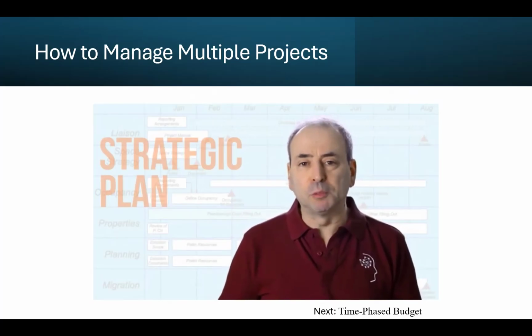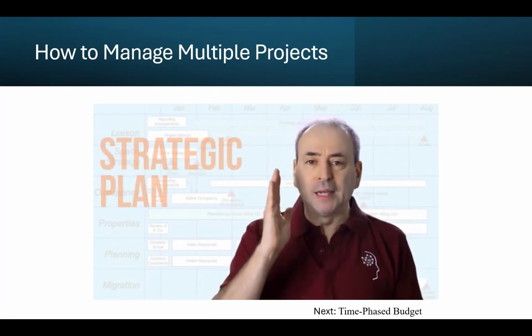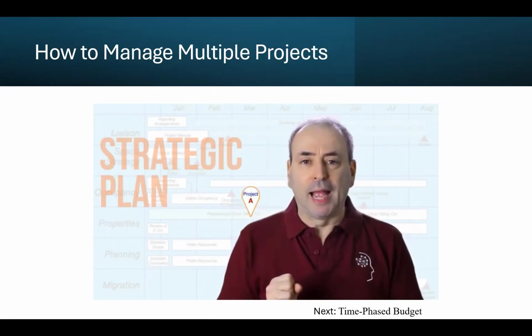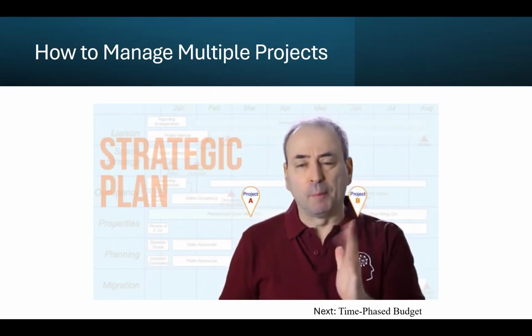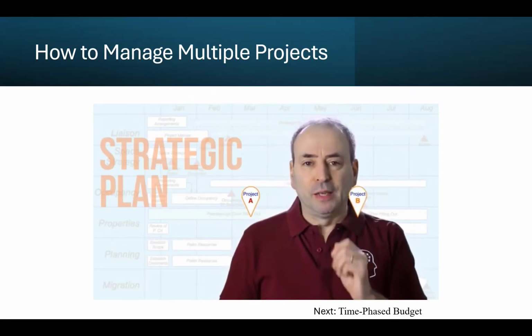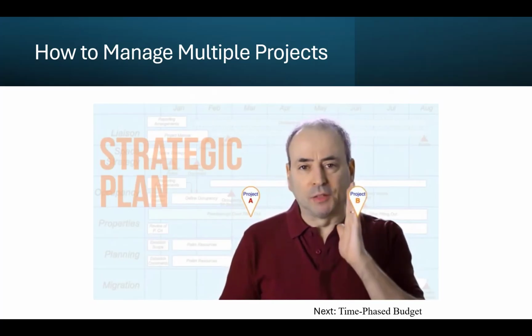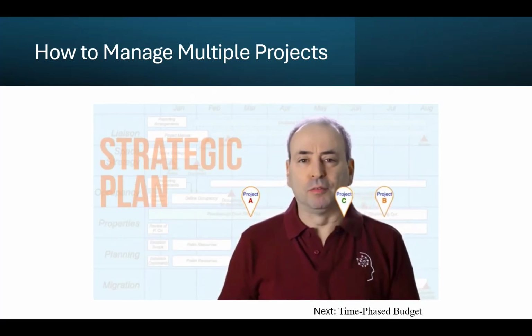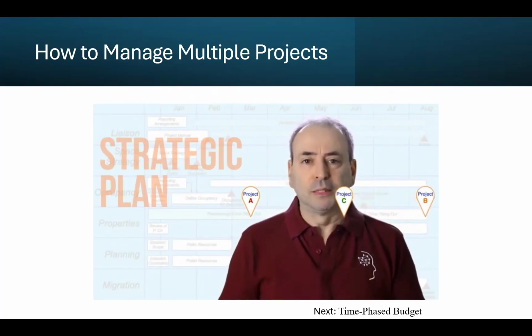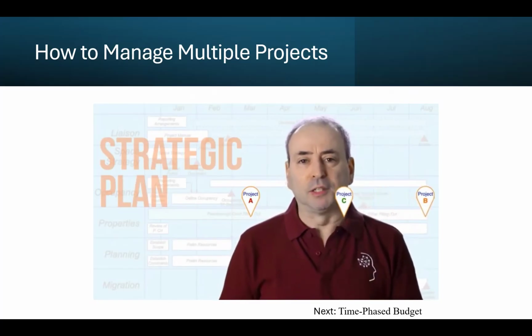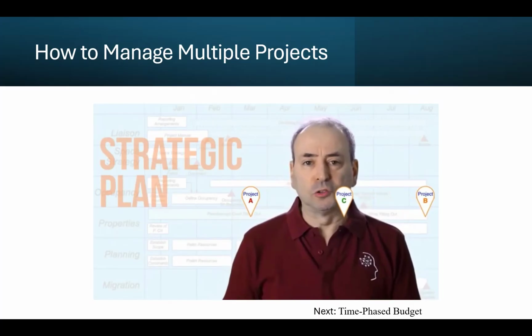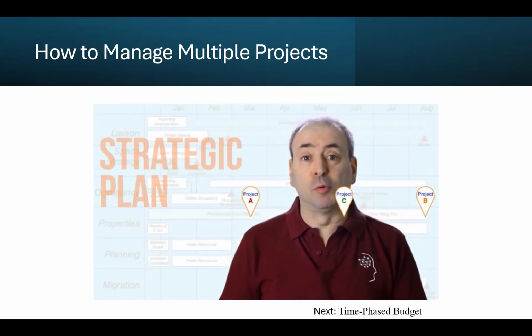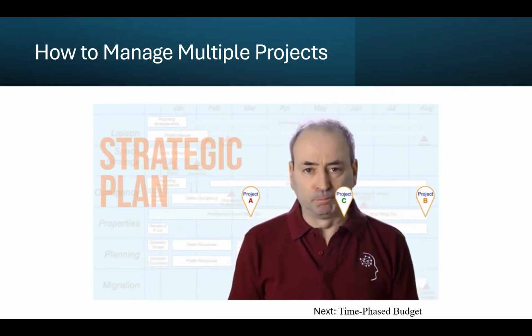You get a reasonable spacing between the major milestone on Project A and the next major milestone on Project B. If you find that Project C has a milestone at around the same time, then shift one of them so that you are able to plan how you give each project your attention, and you're not trying to concentrate on two projects at critical points at the same time.